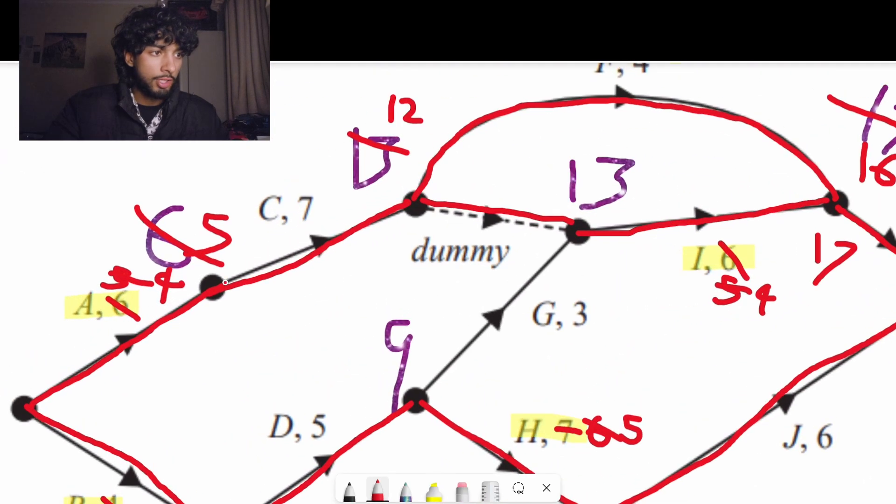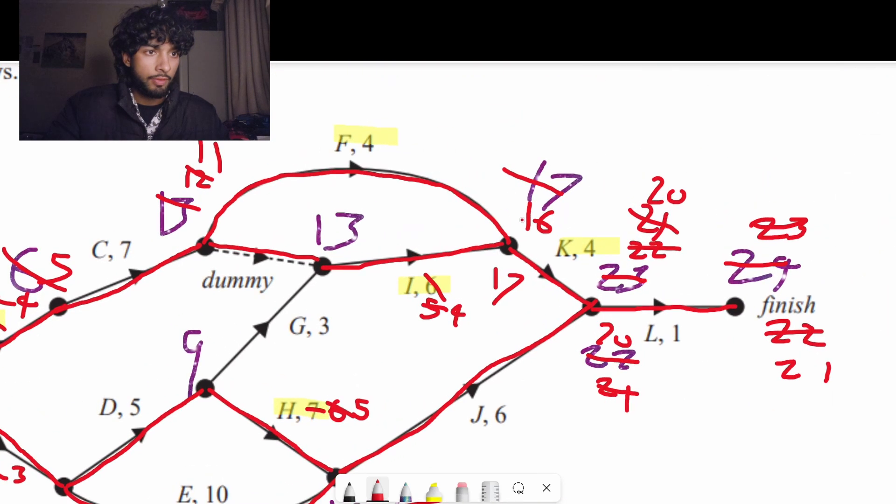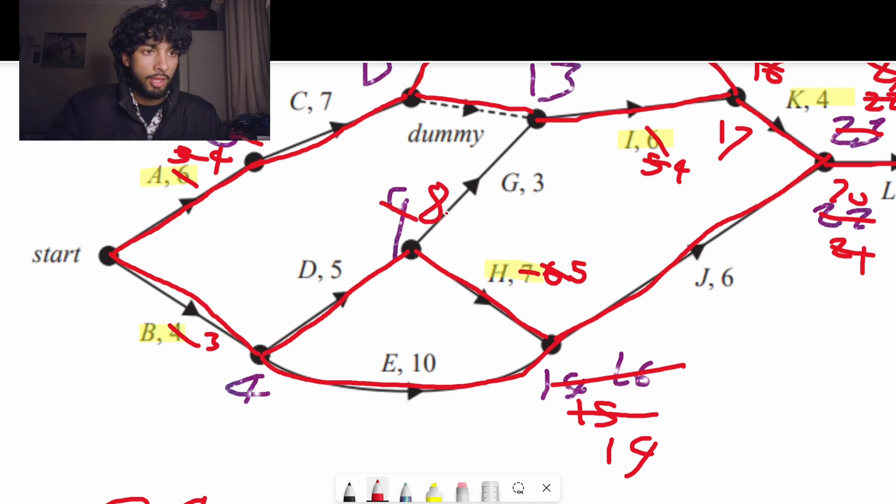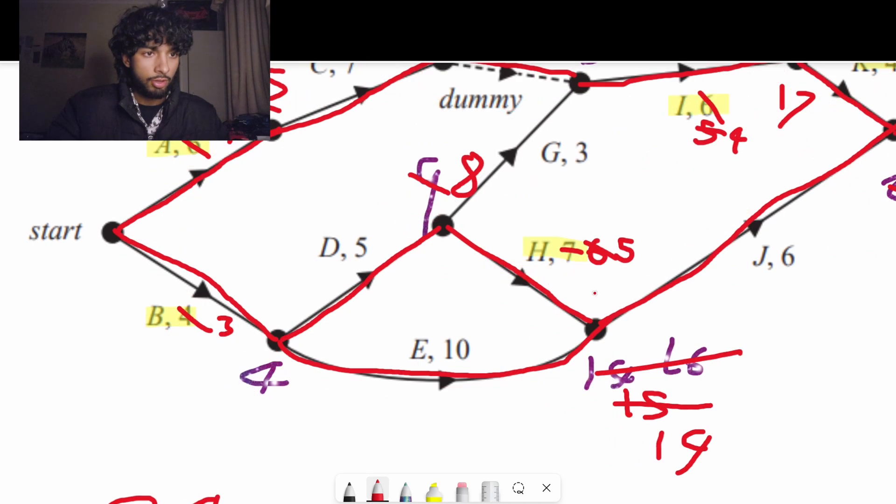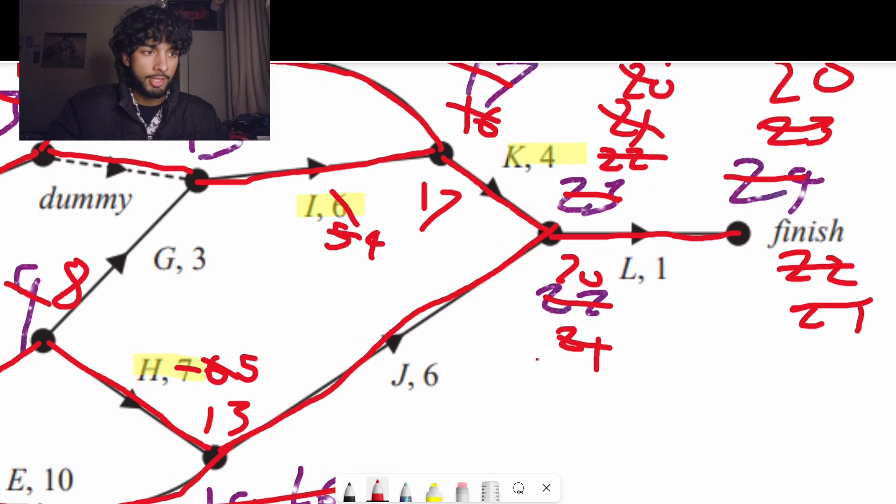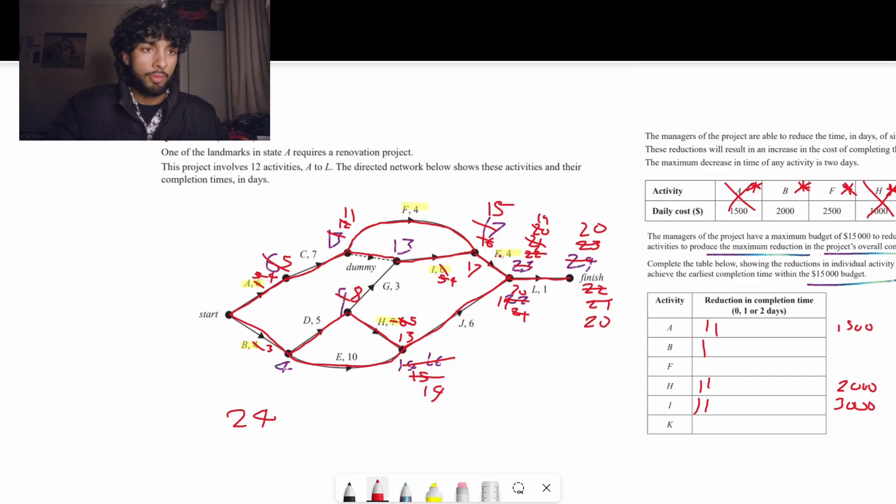So we're going to reduce a and b. So this becomes a 3 and this one becomes a 4. Let's recalculate the critical pathways. 4 plus 7 is now 11. That means this is 15. So top pathway is 20. 3 plus 5, this is now an 8. 8 plus 5 is 13. 13 plus 6 is 19. 19 plus 1 is 20. So right now our completion time is 20.